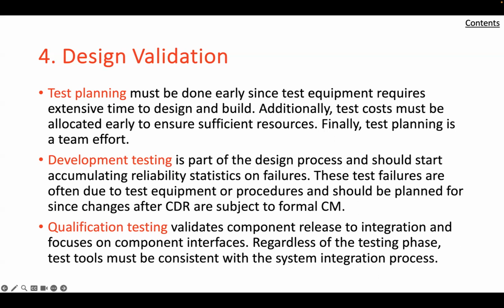This is a direct result of the difficulty of ensuring perfect compatibility between two or more interacting and interfacing components, whether they are system elements or test equipment units. Thus, a period of preliminary test should be scheduled to properly integrate a new component with its test equipment, and test unit testing should not begin until all of the test bugs have been eliminated.